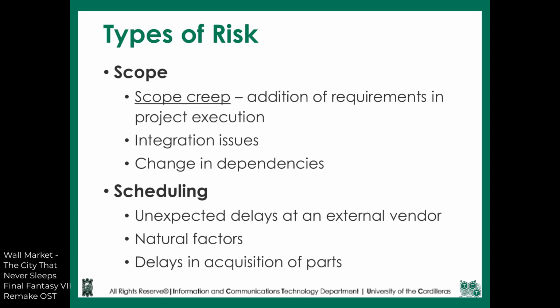Other examples are integration issues, so some of the features have conflict in terms of implementation and change in dependencies. Another type of risk is scheduling, which includes unexpected delays by an external vendor or other external members of the team, natural factors like disasters, and delay in acquisition of parts and equipment necessary.